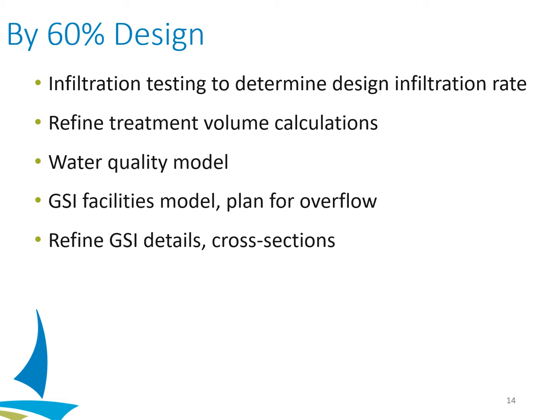So above what the design storm was — do we have an overflow plan or can the facilities handle larger events — and start refining those details and cross sections. Then 90% and 100% will be that same refining point, making sure we're taking into account any unexpected issues that have come up closer to construction, like utilities, or perhaps bedrock or high groundwater, and that we're able to adjust and still meet the ordinance requirements.